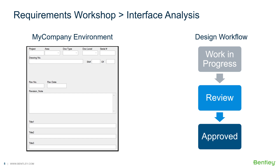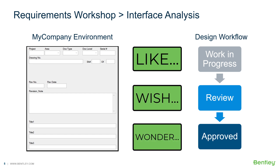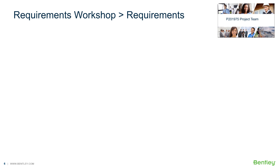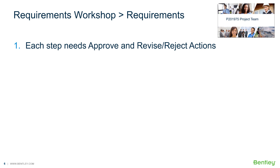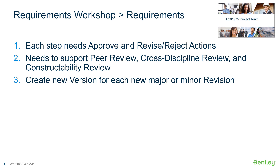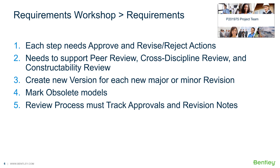The BIM manager and ProjectWise administrator asked the project team during the requirements workshop what they liked about the current setup, what they wished it could do, and what they wondered it could do given the new State DOT requirements. By the end of the requirements workshop, the BIM manager had a list of five requirements: each step needs approve, revise, and reject actions; the process needs to support peer review, cross-discipline review, and constructability review; the team needs to create a new version for each major or minor revision; mark obsolete models; and the review process must track approvals and revision notes.